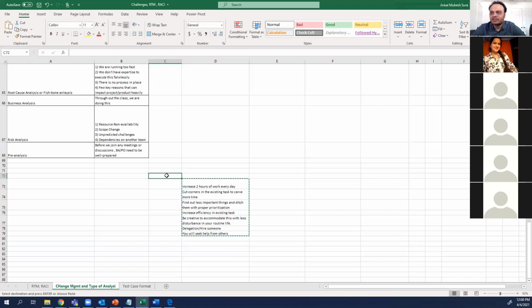There could be a change when someone is doing development and finds a new requirement. Hey, how should we handle this scenario, which is not covered in the BRD? Then we need to talk about change management. There is a user story being written, and we missed a couple of acceptance criteria. There is a change management around that. When we are testing, something works very differently than what we had envisioned. So there is a new scope which nobody has thought about before. How should we handle that?